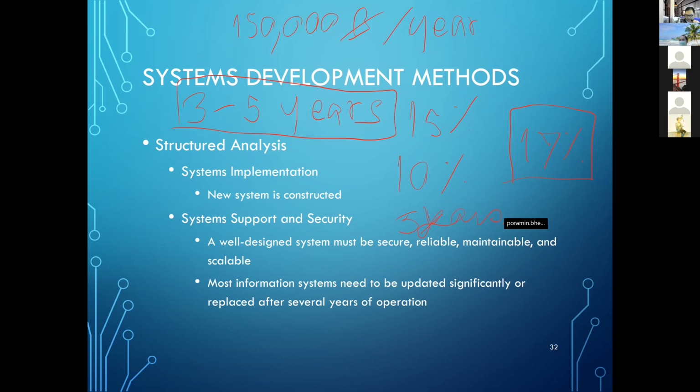For 5 years, that means they divide: if everything is 100%, they divide it by 5. That means they get 20%. So 20% is the maximum percentage of maintenance fee that they should pay per year, because the depreciation for each year is 20%.